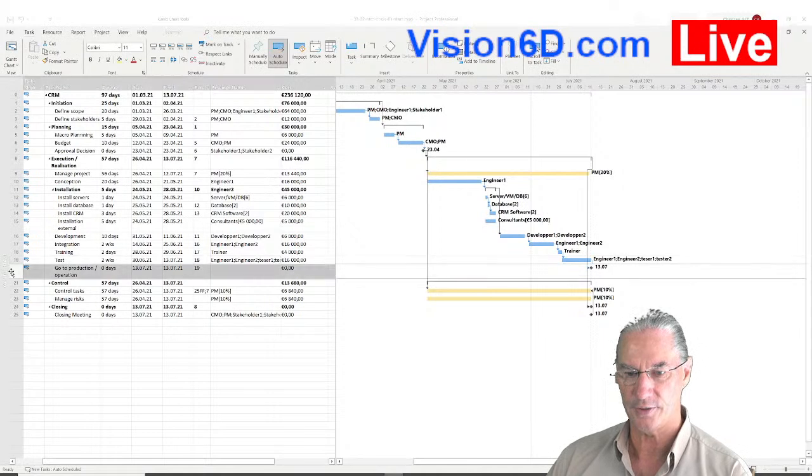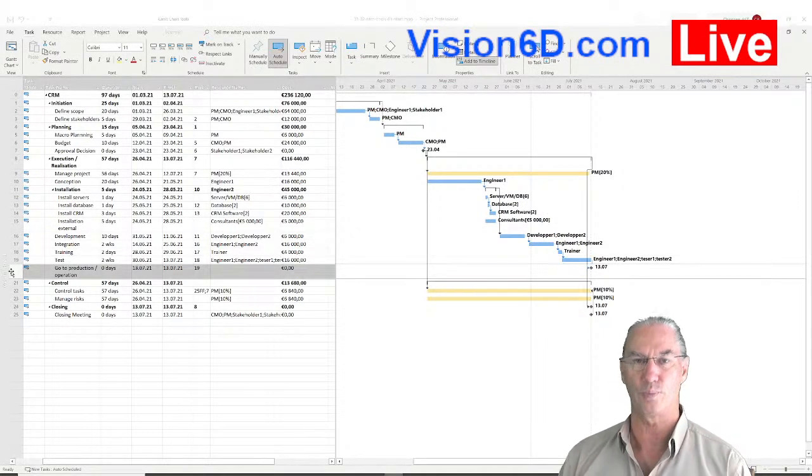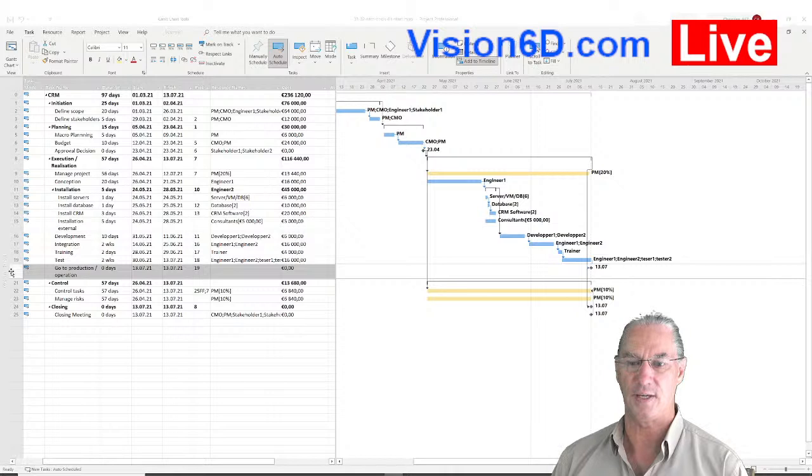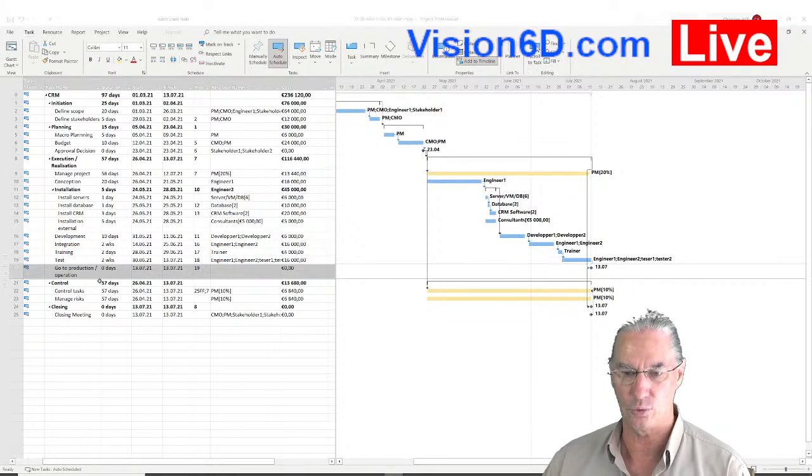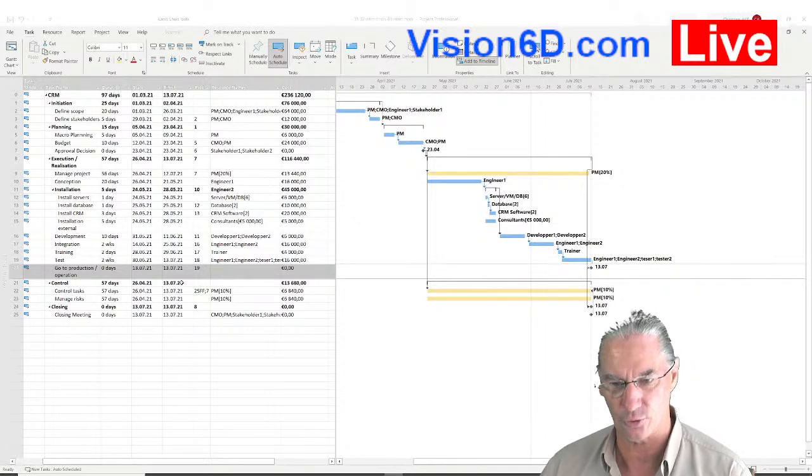You see that here this task, which is the go-to production, this task is a milestone, so it doesn't have a cost, it's a date in fact, that I want to be present, that we know that by this date we should enter into production.